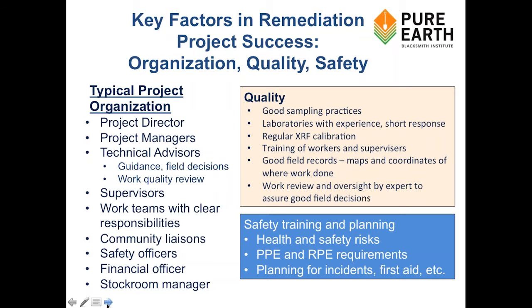You need a stockroom manager. It's amazing in implementing these projects that I've seen supplies walk away. It's amazing how supplies grow legs and disappear. You need somebody to manage the supplies and stockroom, because they will. That's an issue. You also need a full-time safety officer. In a lot of the countries that we work in, they're not used to using good personal protection equipment and respiratory protection, and you need somebody to enforce the rules, frankly, to make sure that you are protecting people.